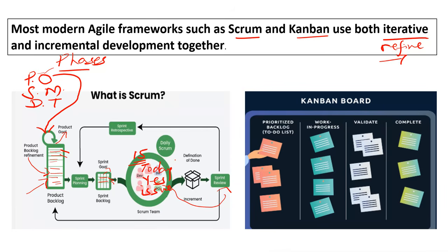The question will come in which ceremony they can invite all the customers or stakeholders. So this is called the sprint review. They will check and they will give some feedback whether they want some improvement or not. If it is acceptable, then the product owner is responsible who will accept or reject the item which is created here. And sometimes the question will come, what are the three important things which we have to do in the sprint review?